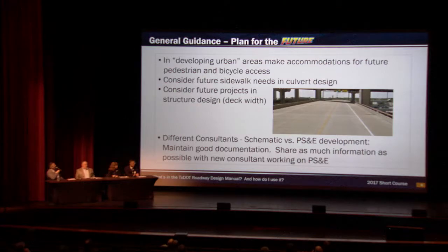Then down at the bottom, we were actually just talking about this during lunch. When you have different consultants working on your schematic versus your PS&E development, maybe some consultants in the room have experienced this, perhaps the district didn't pass on to you a copy of the schematic developed by the other consultant. Let's say you're doing the PS&E. Or maybe the design has changed so much that the schematic is irrelevant, but that may not have all been passed on to you. So we encourage the district to maintain good documentation and share as much information as you can if you have a different consultant doing your PS&E compared to the schematic.